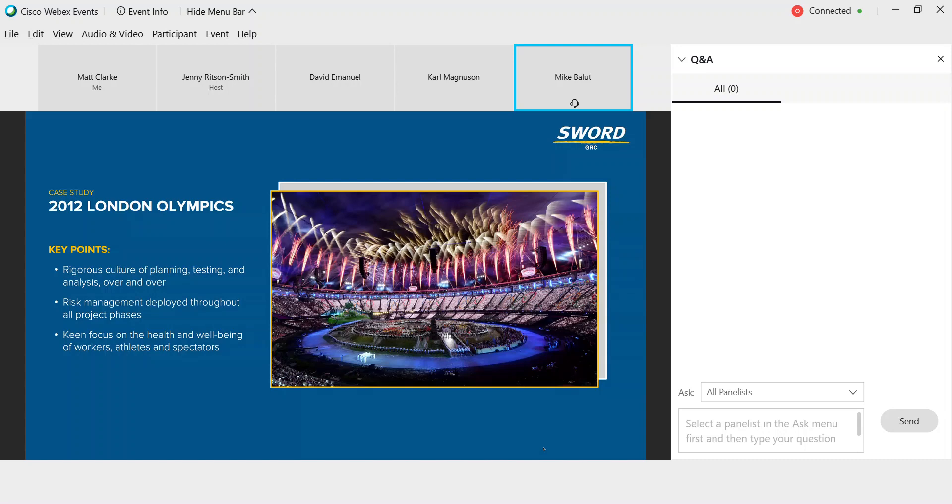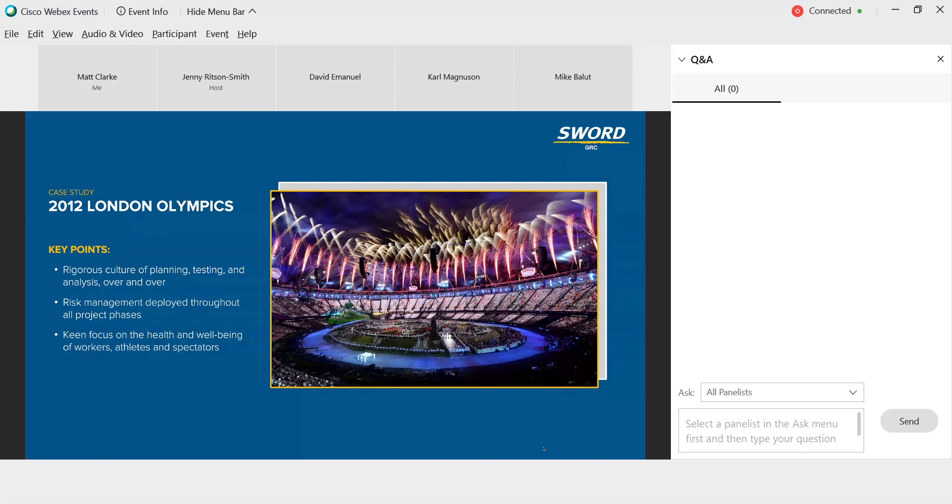Sometimes the early days of a project can provide a sense of how it will perform over the entire project life cycle. A key ingredient for the London Olympics financial success began with a sensible budget and a fixed deadline. According to Sir John, if you have a skinny budget, you have a skinny chance of success. And there's nothing better than a fixed deadline. He was also a very strong proponent of program control, change management, and rigorous risk management. All things that seem to have been lacking in the project failures that we covered earlier. These fundamental beliefs were carried out through all areas of the pre-games preparations. For example, the ODA applied a quantitative risk analysis approach to understand the financial impacts of risk that could affect their projects and also the value of what mitigating those risks might be. They started to do this at the very beginning of the planning phase and continued running analysis on a regular basis until the games actually opened.